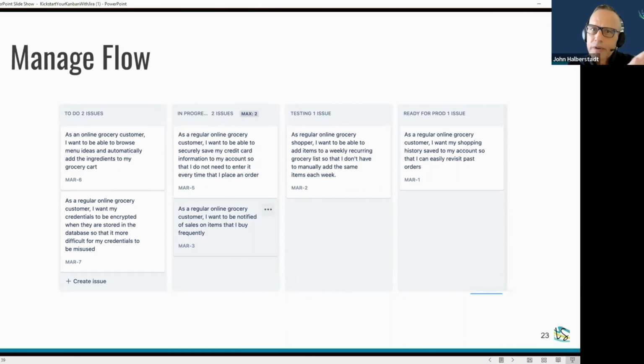But ultimately, once you have what's in place, what Cate had just talked about here, there's some other things that you can do in Jira, like you can put the creation date or aging or some other things on these cards to help see if we do have a problem with flow. So start with the basics. That's the major message for today, both principles and execution as far as the tool. But once you do that, continue to evolve. And there's ways to tune this board that will help provide you and the team with additional information immediately, so you can get some additional context around these items to help with managing flow.